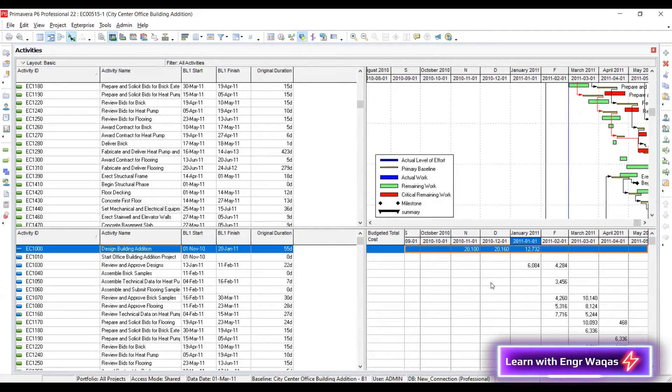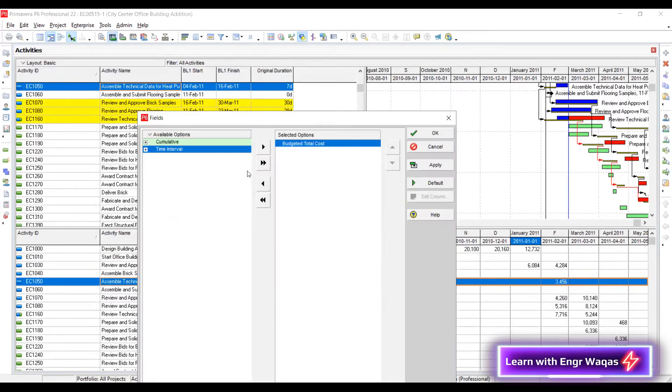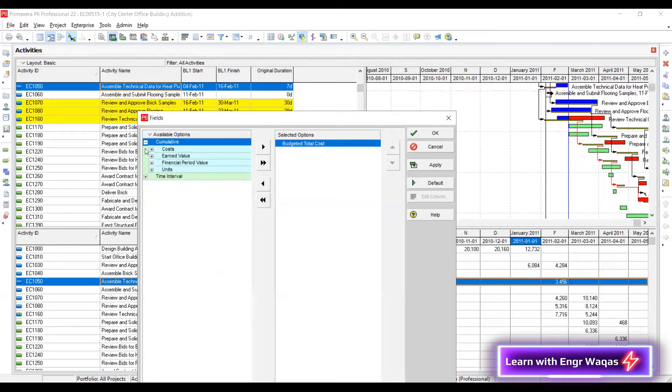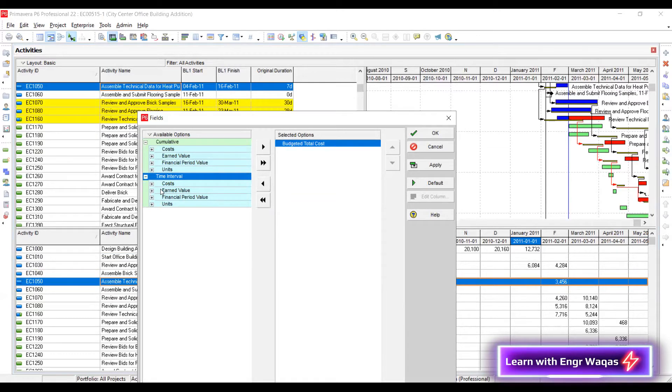Now right click and spreadsheet fields. So here major two options are given to you: cumulative and time interval. The cumulative values are the values which are combined ones till the data date, whereas interval values are only the values which are explaining you, which are narrating the specific time window details. I have explained these things in my other videos, and I'm also actually offering my Primavera P6 project planning control, plant shutdown, delay analysis, and claims management course training. You can also enroll there.